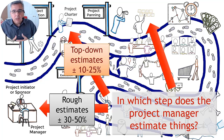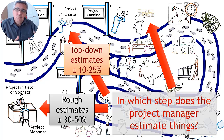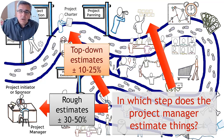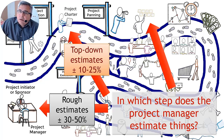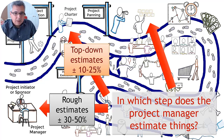If it's more than 20%, that was complicated. In construction companies, you cannot work with 20% — it should be less, because construction processes and execution are very well known. But if you talk about technology, for example, Elon Musk said he will have a new Tesla battery by next year, and that guy has been very off on his estimates. But that's a new technology with so many variables — his estimate can vary plus or minus 200%, depending on the business.